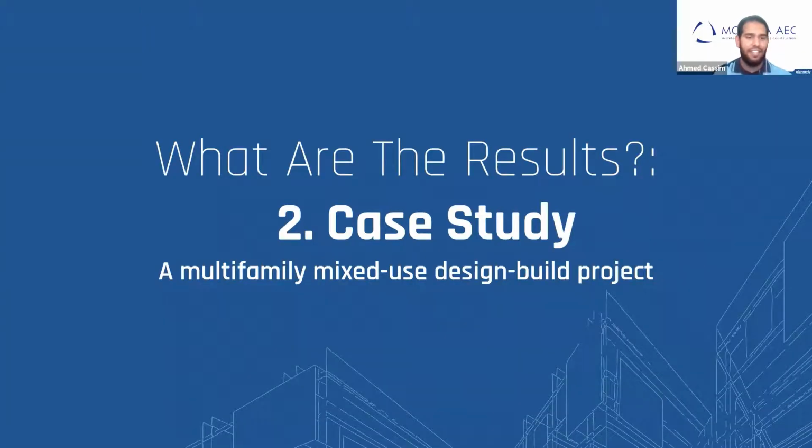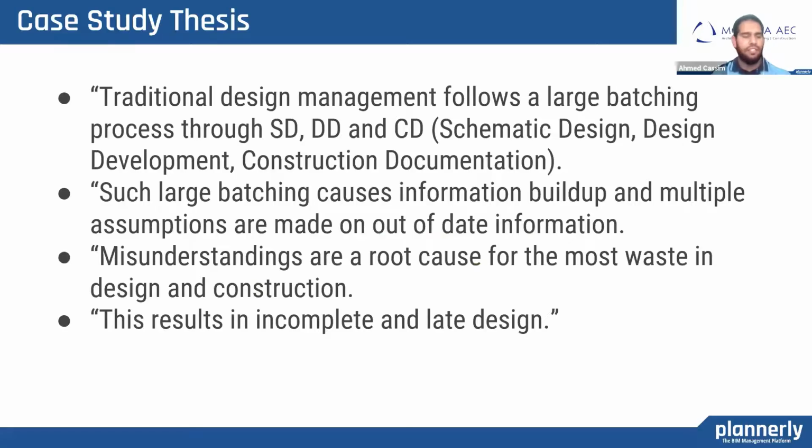And the second case study was then conducted, and it was a multifamily mixed-use design build project with two teams, again on the same project. And the thesis here was that traditional design management follows a large batching process through schematic design, design development, construction documentation, and large batching causes information buildup, and too many assumptions are made on information which is out of date. Misunderstandings are a root cause for the most amount of waste, and all this results in incomplete and late design.